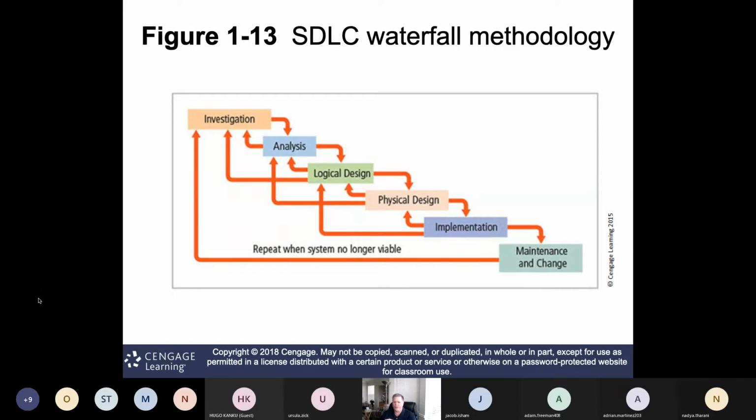You may do all of these in a modified agile approach, but the difference will be the scope. So in a traditional waterfall implementation, the project will do the whole application, every facet, every web page, every server, everything will be done in the investigation stage, the analysis phase, the design phase, the implementation phase, the change phase.